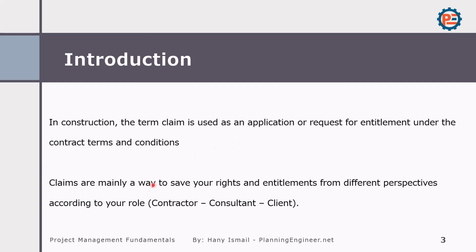Claims are mainly a way to save your rights and entitlement from different perspectives, according to your role, whether you are a contractor, consultant or client. If you are a contractor, you would like to reserve your company's rights if there are any changes to the project, and you would like to have an extension of time to avoid delay penalties. However, if you are a consultant, you would like to be sure that the contractor is entitled to the requested extension of time, because it might affect how you act regarding applying delay penalties.